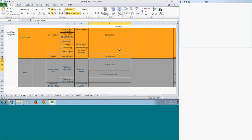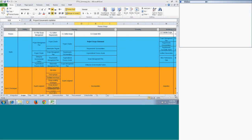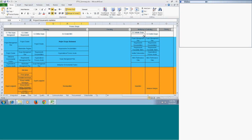The output of Create WBS is the scope baseline, which contains the scope statement, the work breakdown structure, and the WBS dictionary. The WBS represents the lowest level of your work packages. The WBS dictionary is similar to a matrix with IDs, work breakdown structure elements, and definitions. Together, the WBS, WBS dictionary, and scope statement form your scope baseline. Project documents also get updated as you create these multiple things.